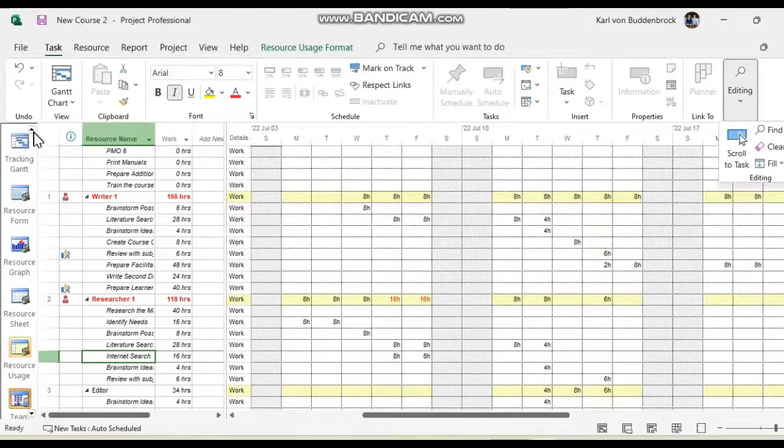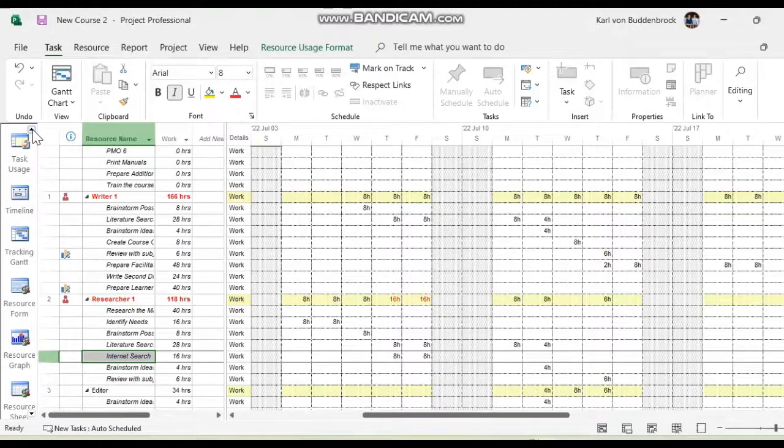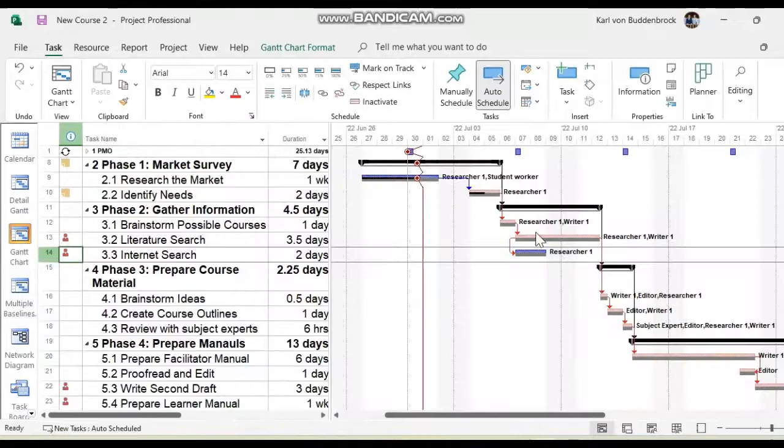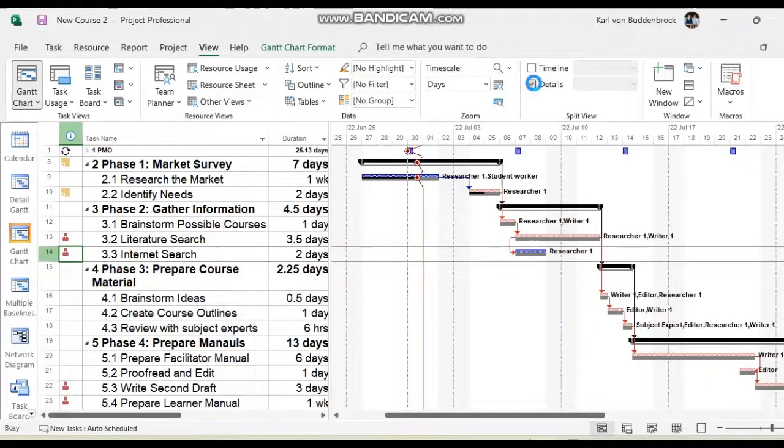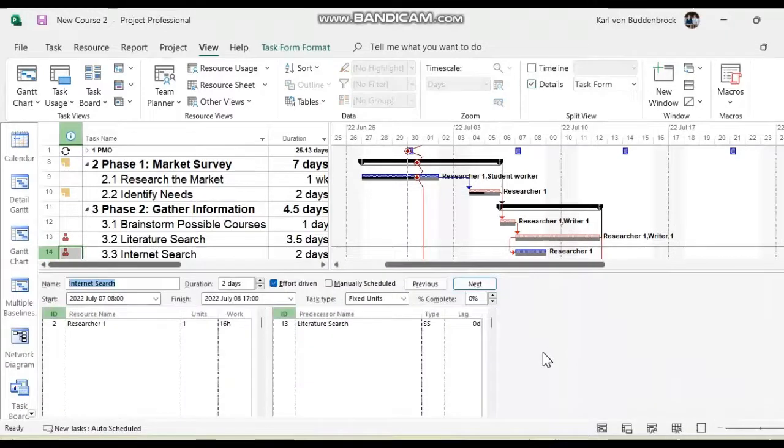Let's also look back at the problem and see where we can show capacity. So clearly, guys, this is on the wall or on the screen, and you're looking at the problem and sorting the problem out now with the PMO. All right. So we go back here. We split the screen. So we go to view. We split the screen, and let's look at the detail of the problem. Let's click on the bottom here and activate the resource graph. I want to know about how many units I am short. Okay, so let's look at the resource graph.